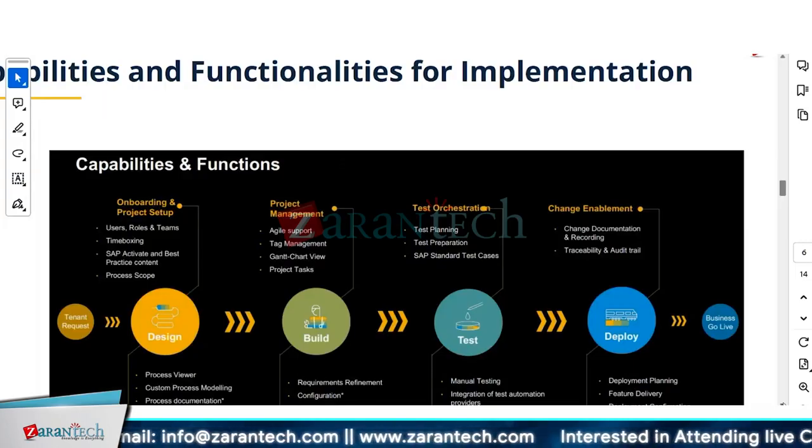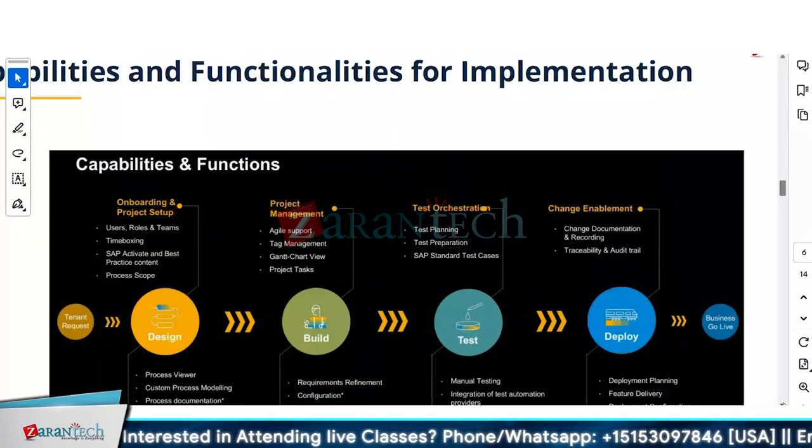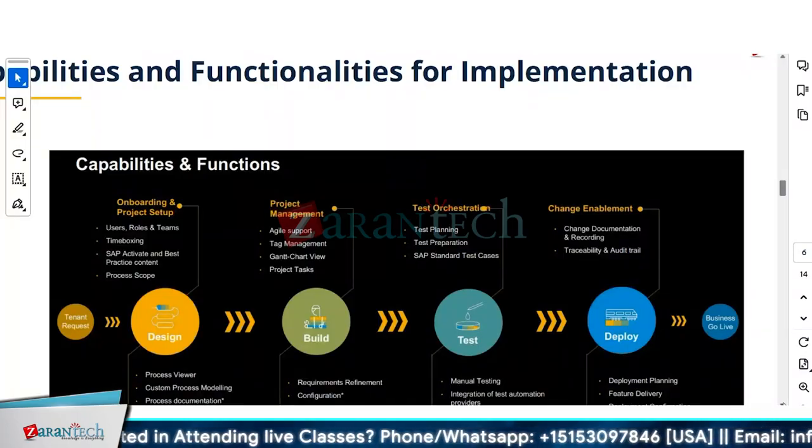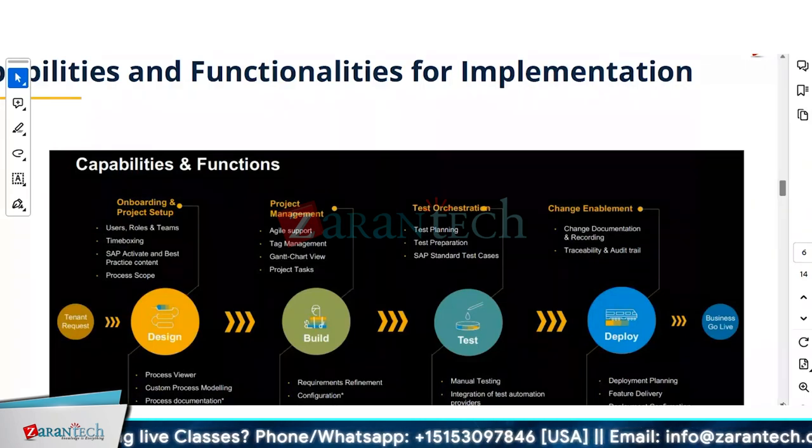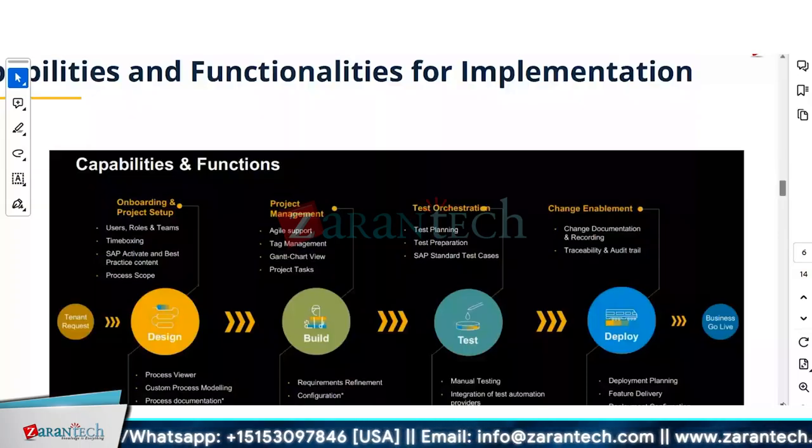Similarly, in the same sense, you have tags. You can create your own tag, right? It could be anything. Obviously you can have requirements assigned to a team, but let's suppose these requirements are for wave one, so you can create a tag wave one and assign that tag to those requirements. Then it comes to analytics and traceability, where you can filter by the tag: how many requirements are supposed to be completed within wave one as part of the build.